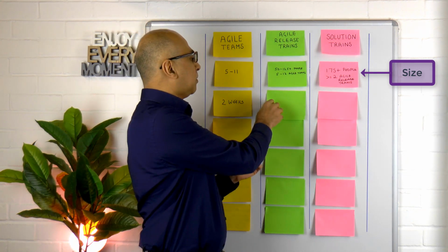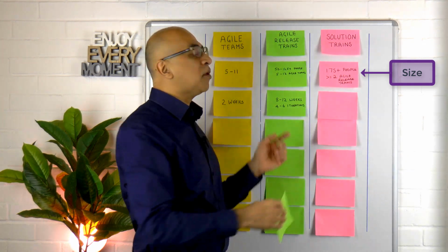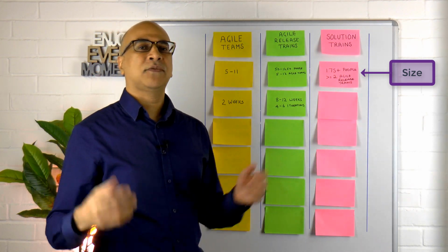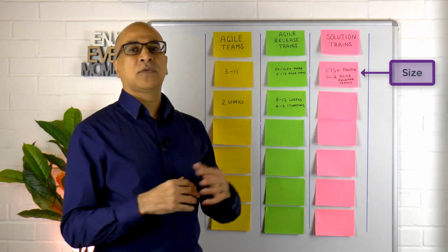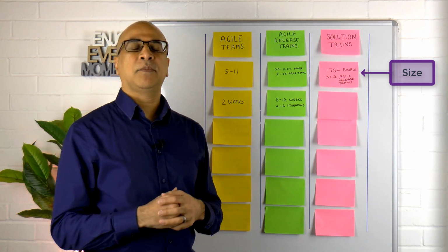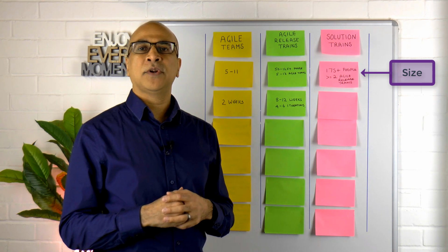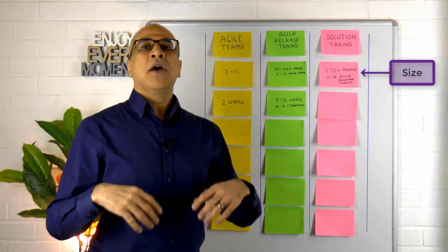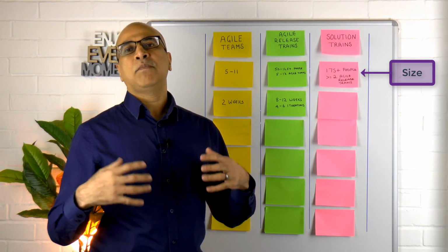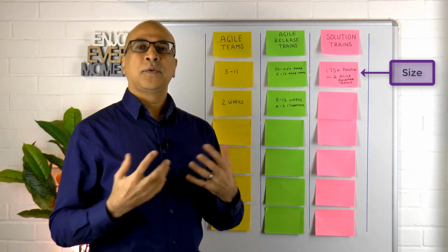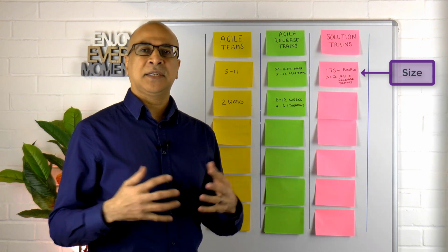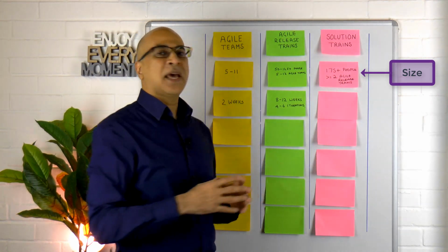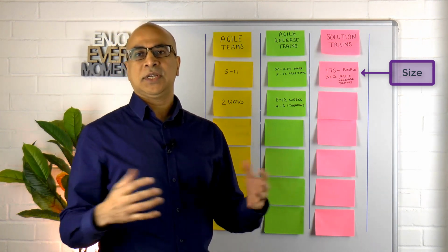What about an Agile Release Train? What is a program increment, which is the program level time box, if you like, and that's between 8 to 12 weeks. It depends upon your specific context, your organization. The default is said to be 10. What I find over here, mostly in the UK, is we use a 12-week cadence because that typically aligns with financial quarters, okay? And that corresponds to 4 to 6 iterations.